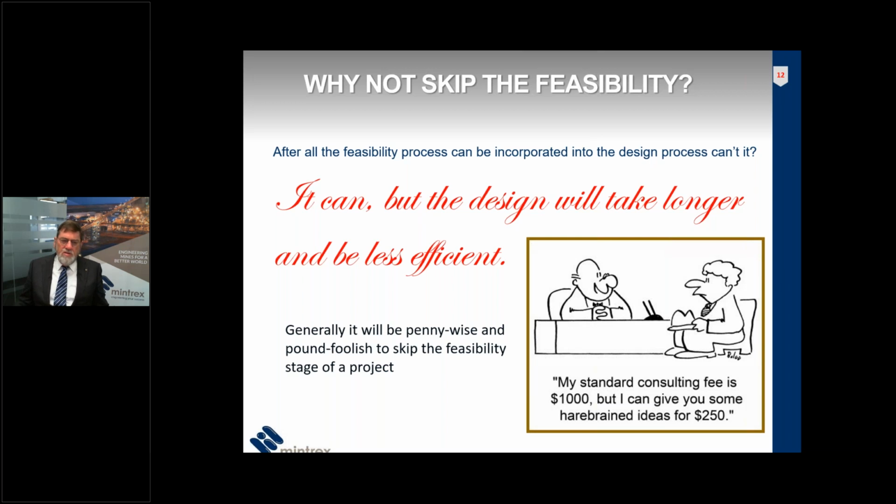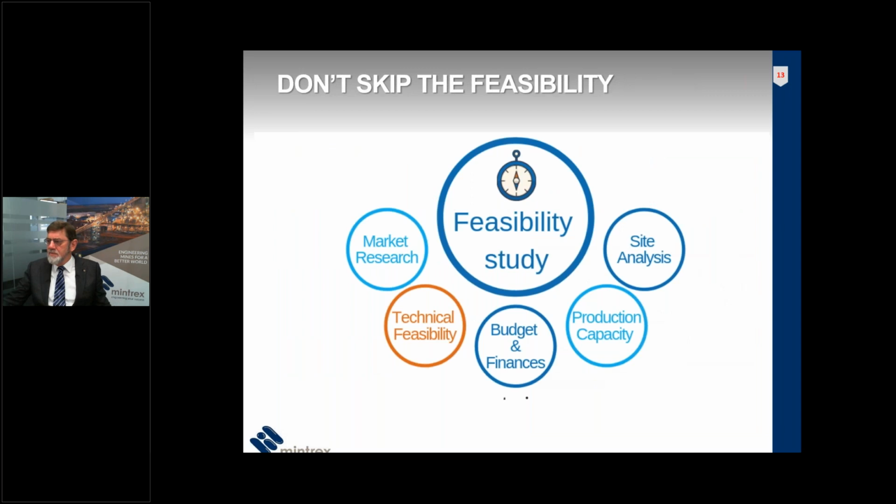So you have more than 40 people, all highly paid, all highly skilled, working on an iterative process, which is what design is. And if they don't start from a very clear scope and a very clear understanding of what the interfaces are and what they're doing, then they're going to do a lot of circular work and it's going to cost you a lot of money.